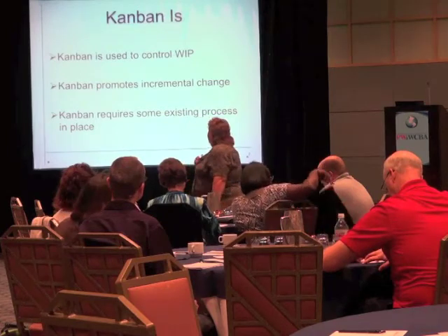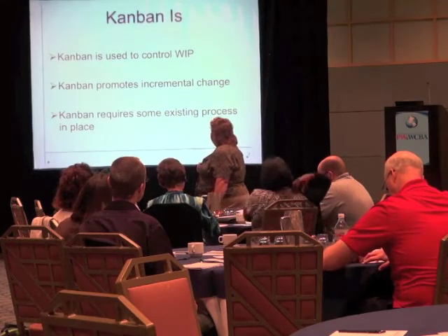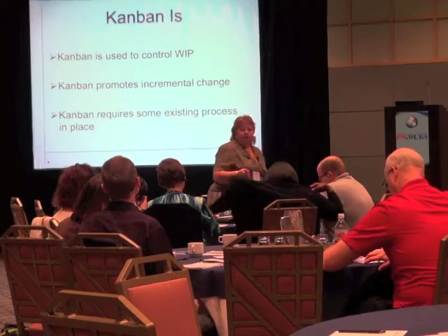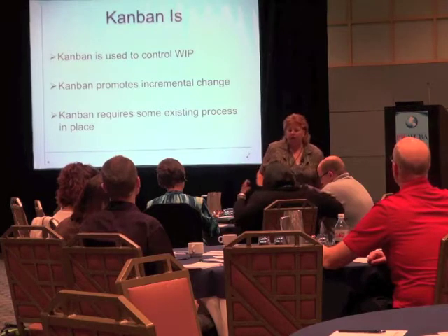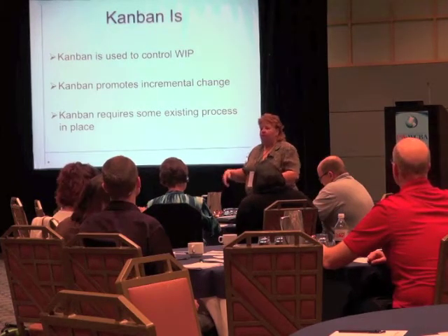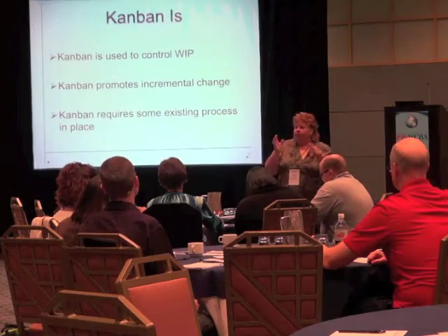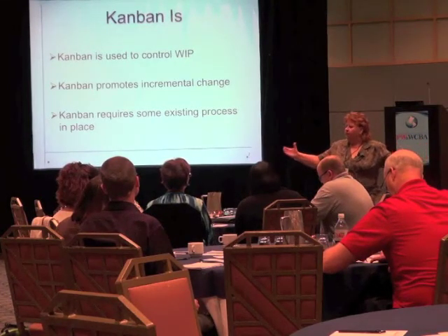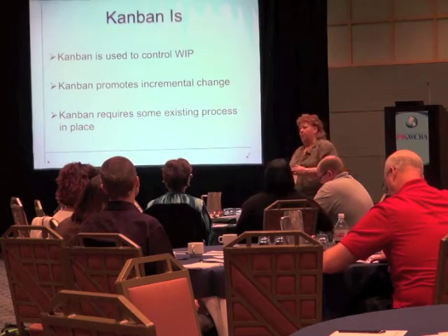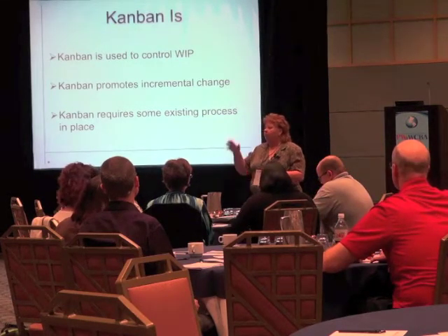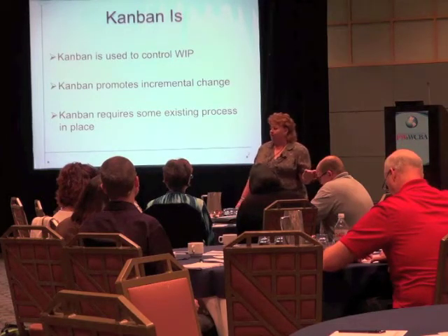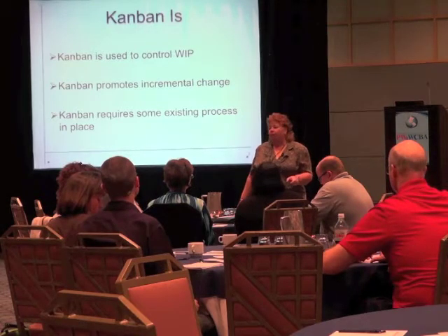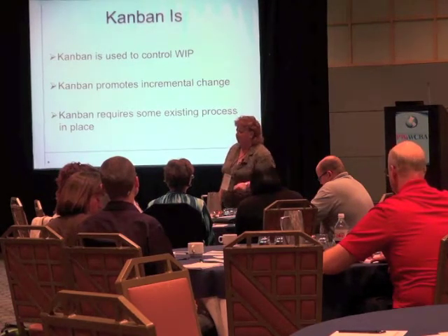So controlling work in progress is essential. There are actually two different techniques that you can use, at least two. One of those is to control the work in its silos. So if we had 4 silos, the first was requirements, the second was analysis, the third was coding, and the fourth was testing, simplifying the 12 steps, right, into 4. Then you could set limits on those 4 key areas, right? That's one method.